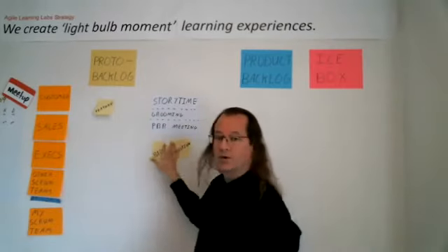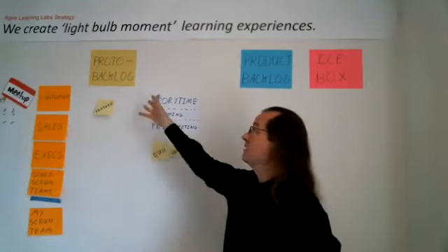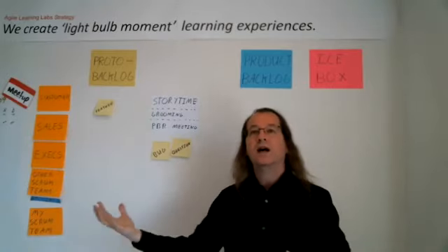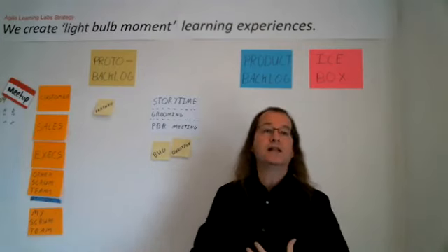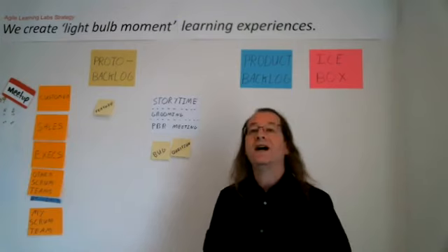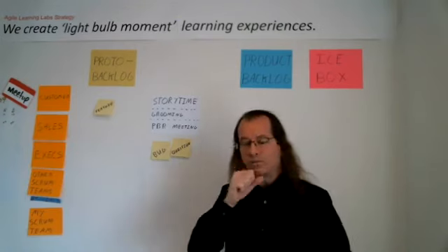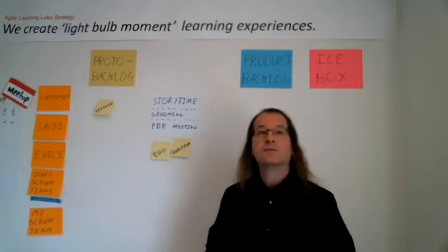And the product owner will bring some potential product backlog items that have been in the ProtoBacklog, get the development team and the stakeholders together, and collectively we're going to discuss and refine these items. We're going to refine and negotiate the list of acceptance criteria for each item. The development team is going to create their initial estimate, right? How much work is it compared to the other items?